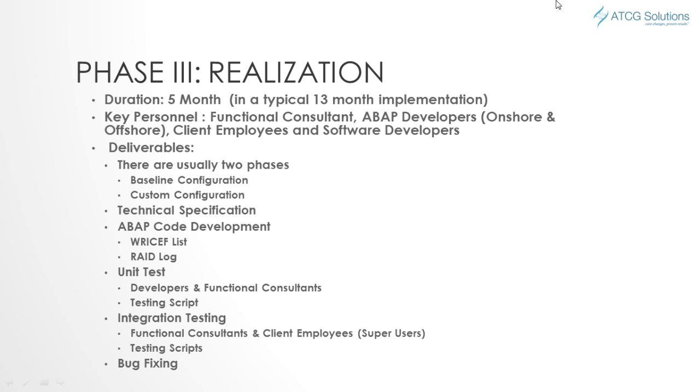During this phase, you also do your unit tests. Usually the developers and the functional consultant will work together to test their development and compare it to their technical and functional specification to make sure they're delivering the solution that the business has requested. During this time, they also write a test script for integration and unit testing, so there is visibility on what they have tested, and it's essential for the key people to sign off, so there are no questions later on.